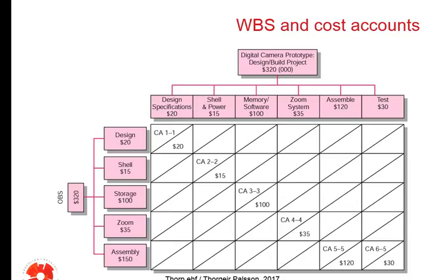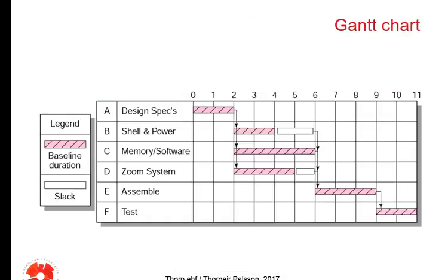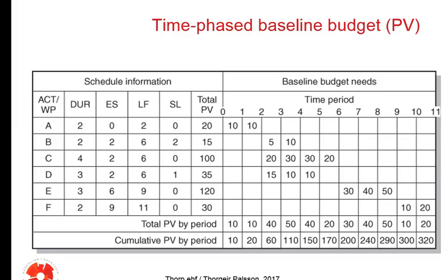So this is how it all connects. It starts once again with the work breakdown structure, the organizational breakdown structure, and you start putting money into the different places. And here you have the PV, the planned value, which is 320 million or whatever, which is the total estimated cost of our project, spread out into the time units like shown here, okay?